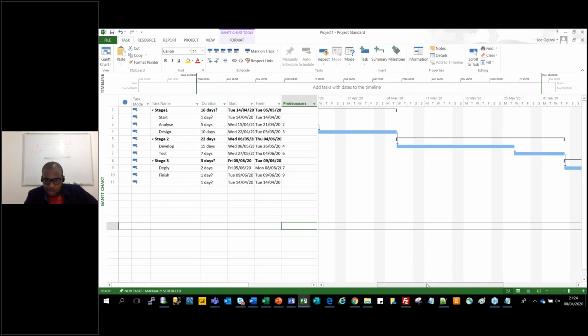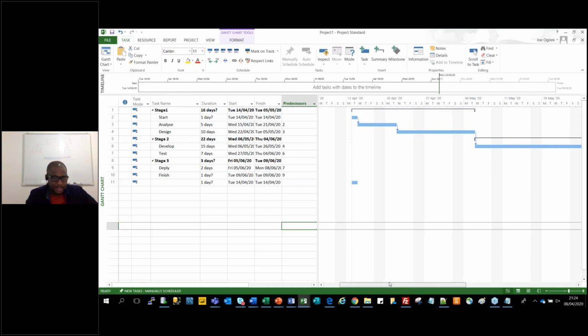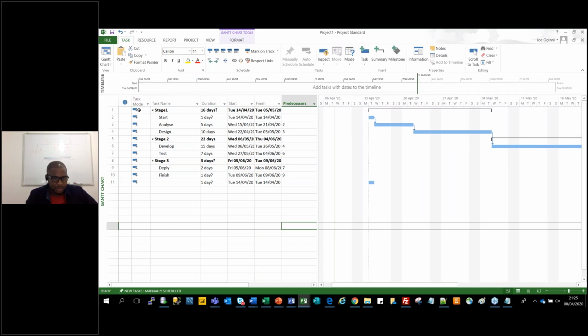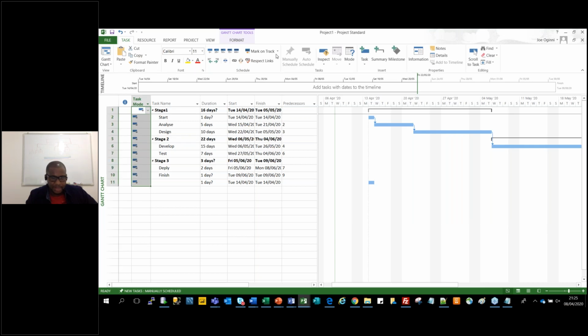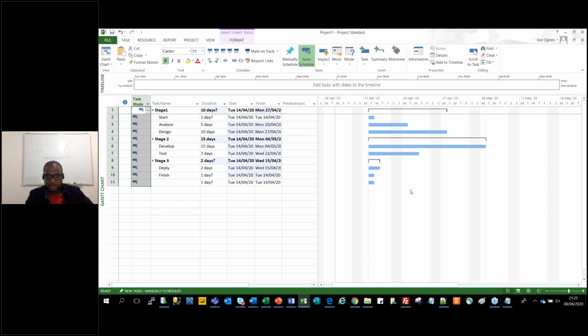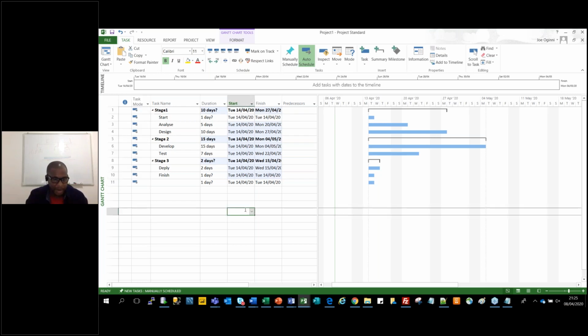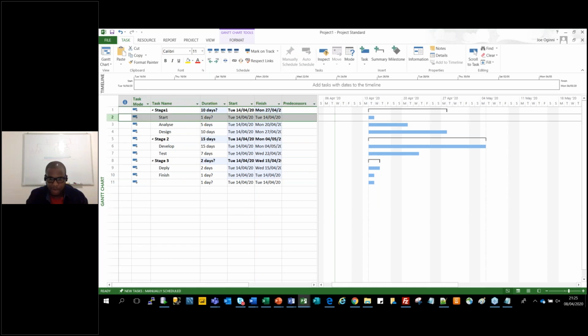And one of the things you could do is, let's do something. I'm going to select that and unlink it. Sorry. Select that and unlink all of them, so they come back to the same place. That's what they have. Now, I just want to quickly show you. Instead of linking like that, I could go pick that and drop it on top of that. I could manually link it.